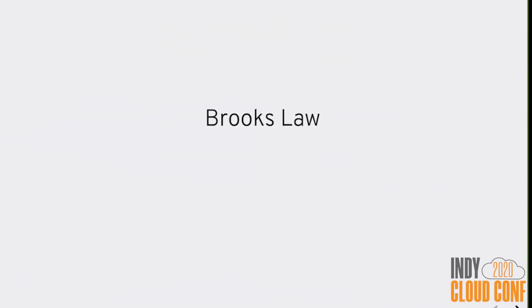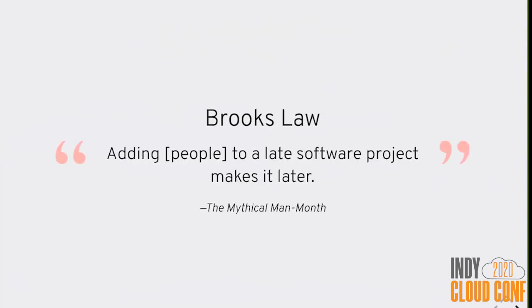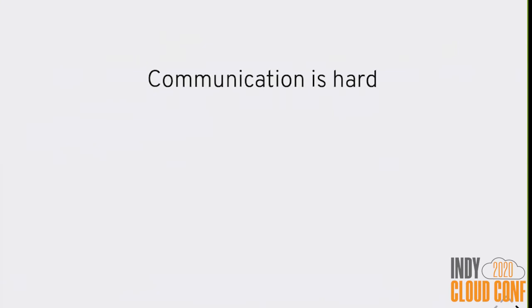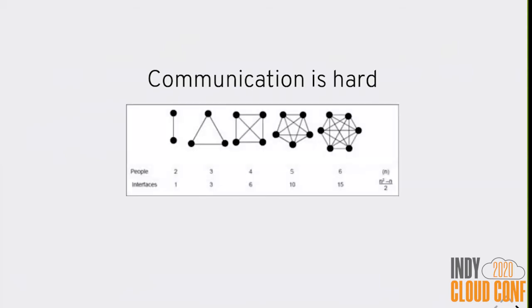First up, you may have heard of Brooks' Law before. Adding people to a late software project makes it later. I'm sure most people have heard of this at some point. If not, well, you've heard it now. Why is it that adding people to a late project makes it later? Well, fundamentally, it's because communication is hard. Communication is very hard. Why is it hard? Because it does not grow linearly.